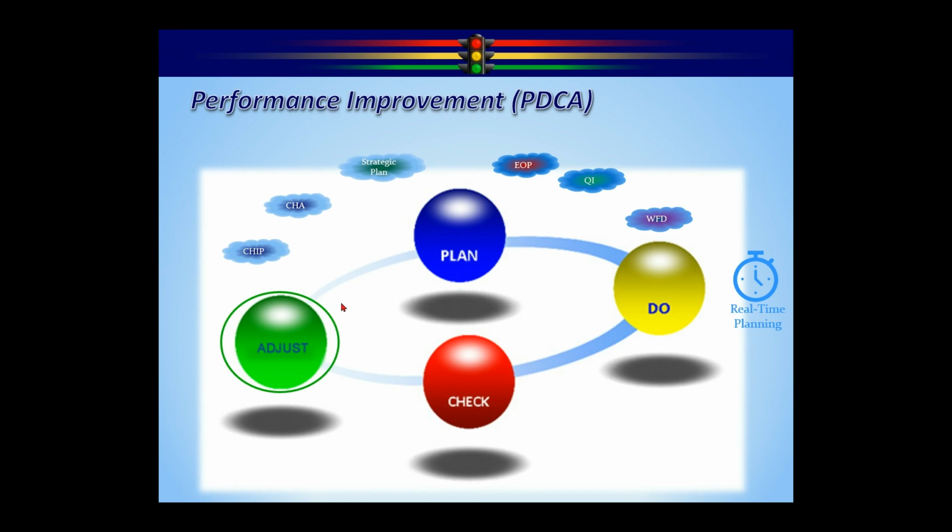So that's, kind of, step 1 is no change necessary. Step 2 is adjust the plan if it makes sense. Step 3 would be adjust the resources if we have the resources and it would help. And then there's a 4th option, and that might be adjust the plan and the resources. So maybe we think we could get to 23% reduction, not 25, if we went to 12 training sessions a month. So maybe that's kind of a combination of both of those.